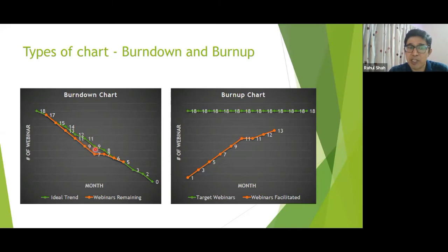Even in the task burndown, what will happen, you know, right? If I add some task, and hours are there, there will be a spike. Right now, I'm not showing that. If I'm adding and removing, then there won't be a spike. But if I'm adding, Jira certainly will show it, because we cannot do everything at one time. There will be a seconds difference. So what Jira will show is it going up and then going down. So we added something and removed it, and that will be visible there as well.